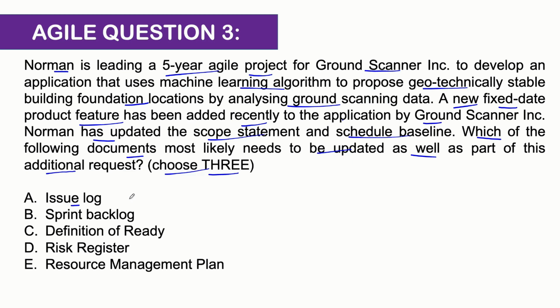Okay, but if you see here, this is not something which you envisaged when the project started. So it's a scope that has come out of the blue, which is okay, which you need to cater to as Ground Scanner is your client. Okay, but it can't be classified as an issue because it was not something that came up when you were doing the risk analysis of the project in the planning phase. Okay, so issue log will not be updated here for sure.